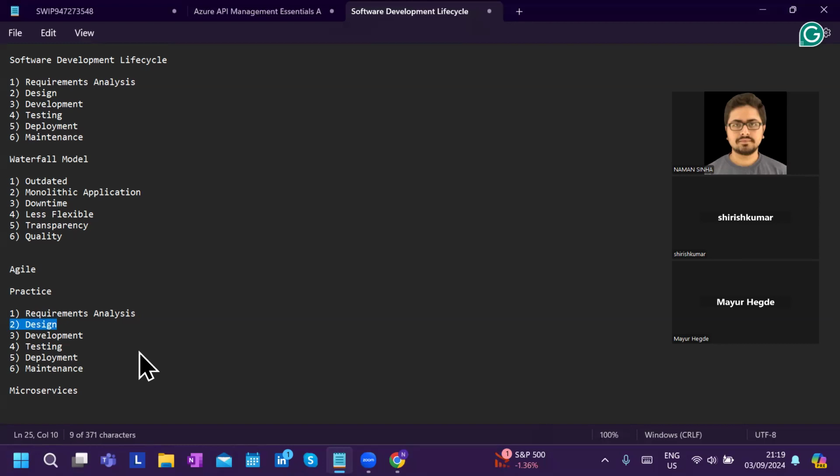In this entire setup, while this was happening in, let's say, 6 months, in the fourth month, if HDFC got a different idea, HDFC has the option to submit it to Accenture, that, hey, these are my new set of requirements, or changed set of requirements, or updated set of requirements. This requirement, when pushed to the Accenture team, they push it to something called a backlog.